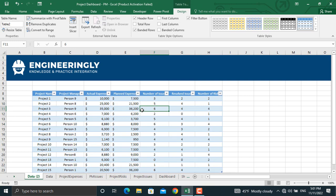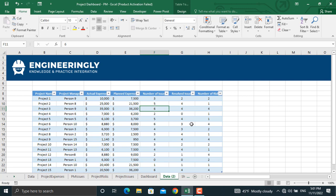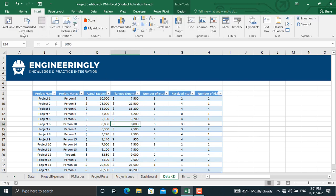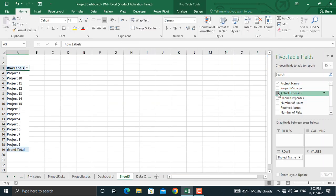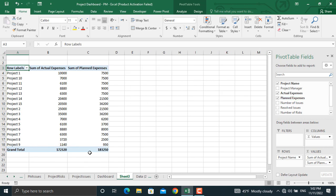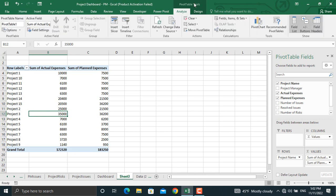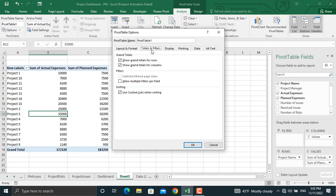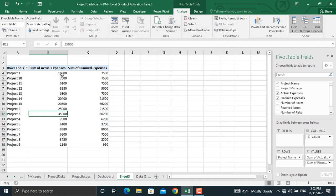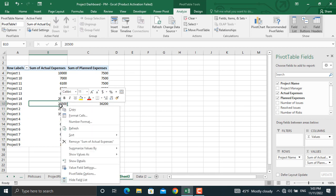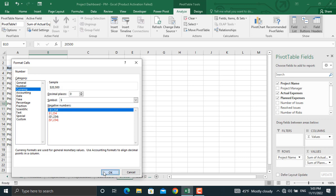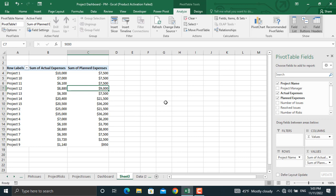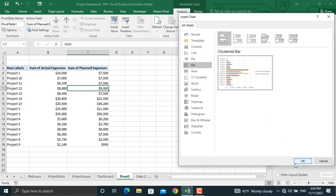Now we will analyze this data using pivot tables. To create a pivot table, click anywhere inside the table, go to Insert, and click Pivot Table. We'll create our pivot table in a new worksheet and click OK. In this pivot table, we will select the project name, the actual expenses, and the planned expenses. I won't need the totals, so I'll click inside the table, go to Pivot Table Tools, and from the options remove the totals for both columns and rows, then click OK. Next, we'll convert these numbers to currency — right-click, go to Number Format, select Currency with zero decimal points, and click OK. We will do the same for the next column. Now we will insert a pivot chart — click Pivot Chart, go to Bar charts, select the first one, and click OK.